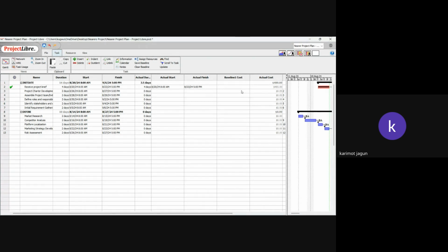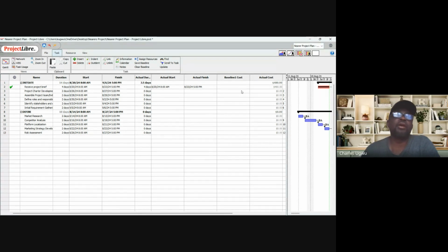I'm not saying we are not going to include them, we know that we've been including them. But I just want to know whether other employees involved in the project, are we also going to add them? Everybody that is part of this project, that is receiving payment from this project, any cost, whether material cost or human resources costs, you need to add all of them here.